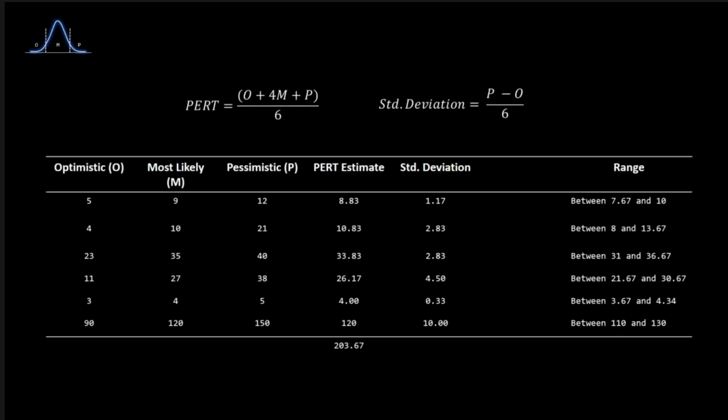First, we can simply sum the individual PERT estimates of linear activities to get a rough value. Keep in mind that if activities overlap, summing their individual estimates may not be accurate. This is a good moment to consider using software to help you calculate true dependencies. In this example, we can safely assume that all activities will take place one after the other. Hence, it makes sense to sum their estimates.